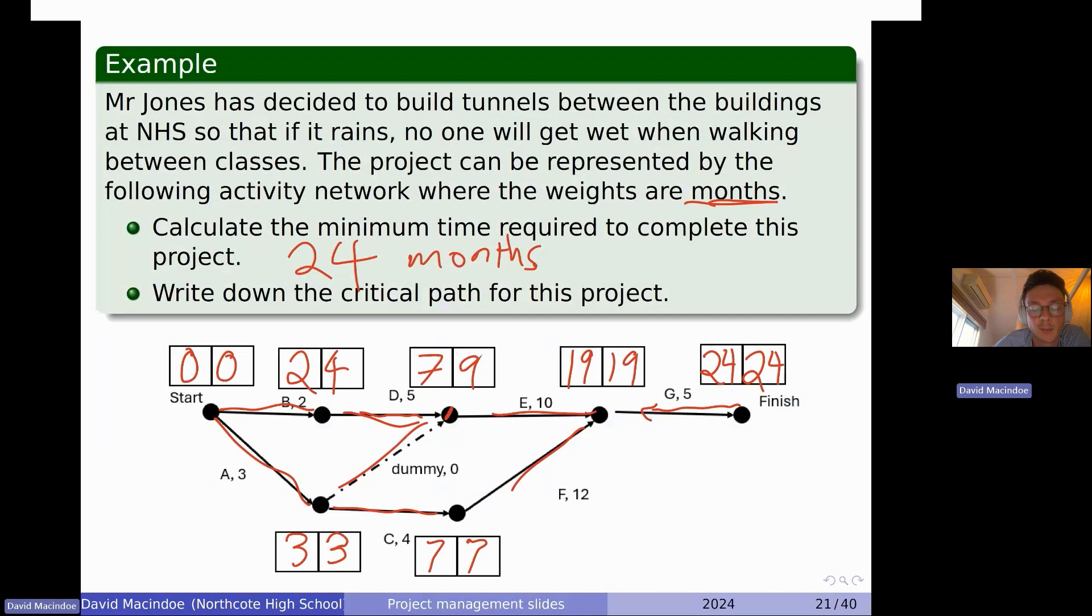Now our critical path is where our float times are zero. That is where your EST and your LST are the same. There's only a few spots where it's not the same. So we can see that the float time is going to be zero from here, and then you're going to get zero down here, here, here, here. So what I would do is if I'm writing this out, I'm just going, okay, it's start and then I'm doing A. I'm going to go to C next, then to F, then to G. And that is my critical path.